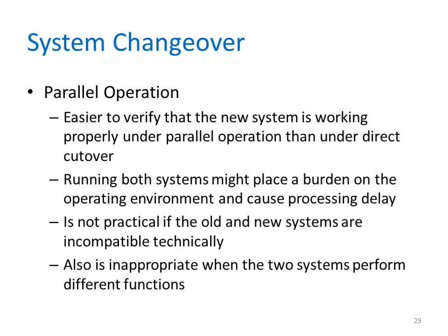The parallel changeover method requires that both the old and the new information systems operate fully for a specified period. Data is input into both systems, and output generated by the new system is compared with the equivalent output from the old system. When users, management, and the IT group are satisfied that the new system operates correctly, the old system is terminated.